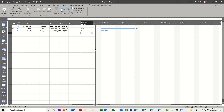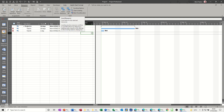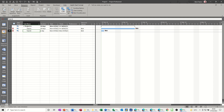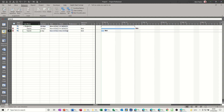Another way to split a task is to use Task Usage and actually just put zero hours in for Bob on that particular task. You could also use resource levelling to get the computer to move Bob. If I click on that — I'll go Level All — it's just moved it, and then I'll clear levelling. Sometimes when you do levelling, it does split a task because there might be something Bob can't do or is doing something else. You will get a split task appearing — you make a choice whether you want that or not.